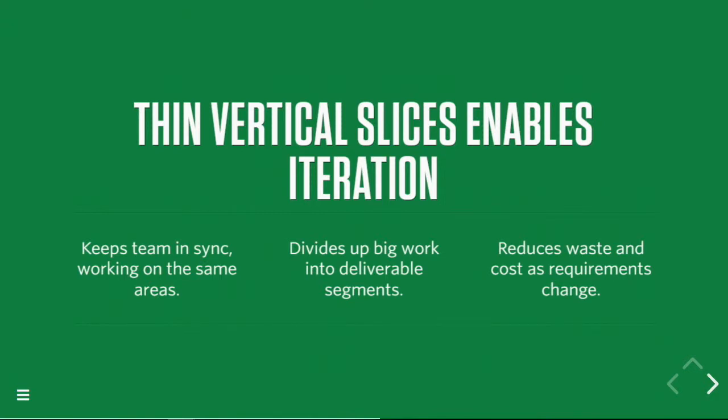In fairness, there are exceptions to every rule. Sometimes it does make sense to build things horizontally. Like if you are planning a big migration and the migration has to happen first, you know, this is Drupal, you're going to need all your content types built. Or if you're doing a huge content rewrite, maybe you need editorial tools first. But it's really important that you account for every layer that you haven't built for every feature you touch.